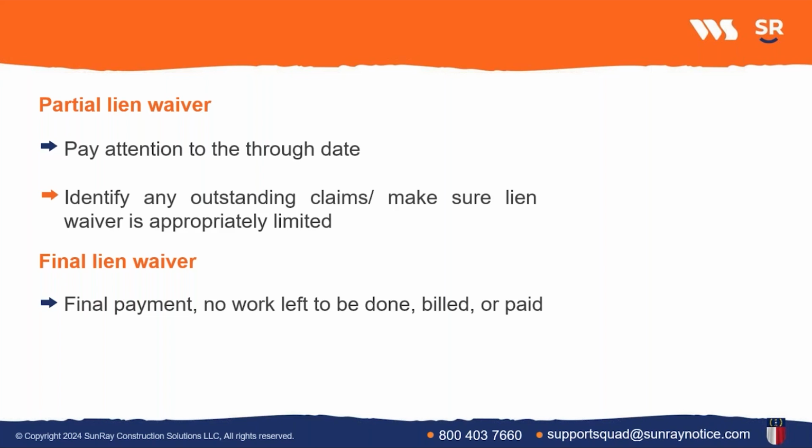You want to make sure that the through date listed on the lien waiver is Monday. That's the work that you completed. That's the work you're getting paid for. So you only want to waive your lien rights up through that date, not through the date that you're signing the lien waiver, unless the date that you're signing the lien waiver is the date that you're waiving your lien rights through, which typically is not, because it's unusual to sign it on the same day that you've finished work and that you've billed work for.